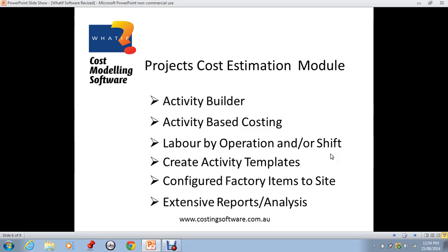Materials can include configurable items from the standard product costing module, which can be reconfigured in terms of dimensions as required in an activity's bill of materials. An example of this would be components made in a factory off-site and then delivered for installation on-site. Each material added to an activity's bill of materials can be scheduled with a start and finish date. Detailed activities can be moved between headers and subheaders as the project grows to ensure better control and reporting efficiency.